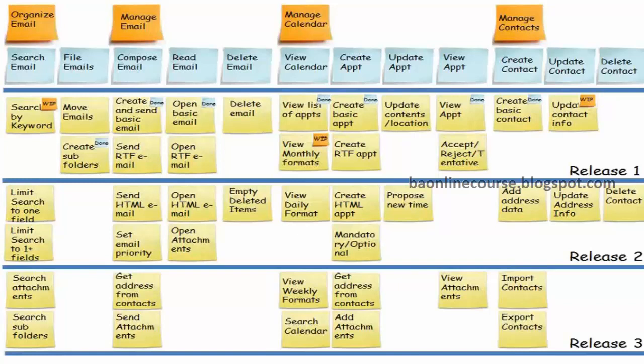While I understand there would be some dependencies, you'll try to keep those dependencies in mind, and usually the priority also would be like that. If there are 3 or 4 requirements which are dependent on one, obviously the priority of that requirement becomes more. So you want to develop that in release 1.